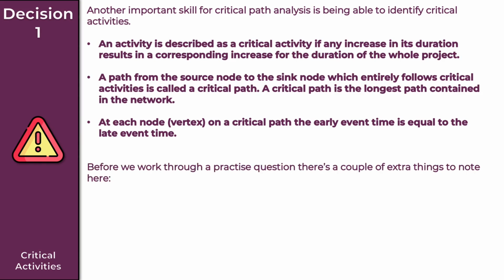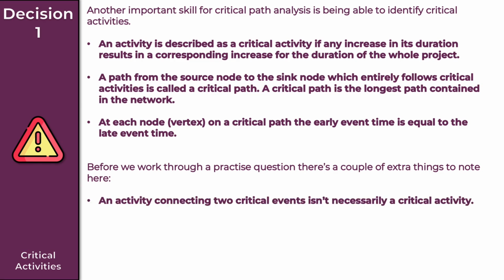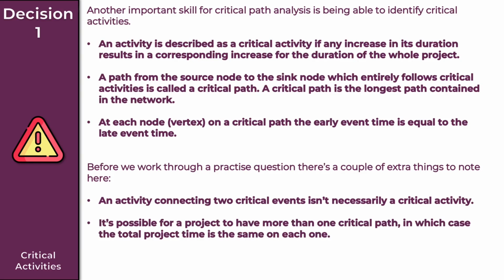Before we work through a practice question together, there are a couple of extra things that we need to know. For the first point, an activity connecting two critical events isn't necessarily a critical activity. So that's an important point to be aware of. And finally, it is possible for a project to have more than one critical path, in which case the total project time is the same on each one.